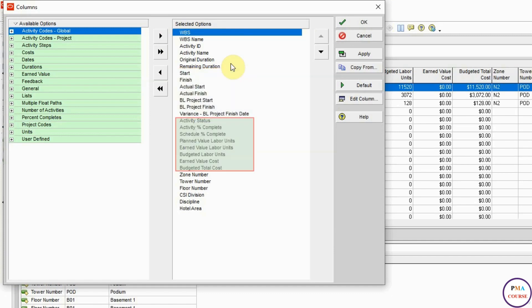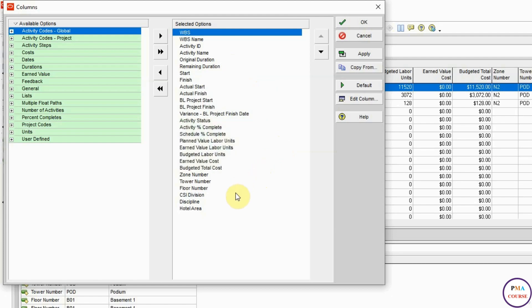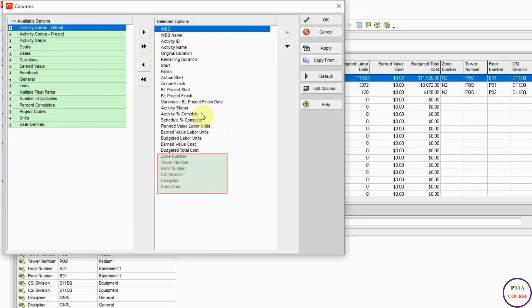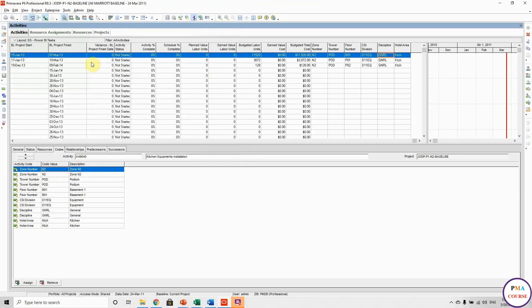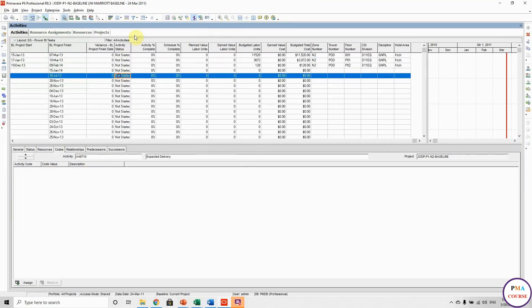The third category is activity status and earned value information: schedule percent complete, planned value, earned value, budget at completion units, and earned value. So all our earned value information. The last category is the codes, which we did before: zone number, turn number, flow number, and so on. I'm going to share this layout with you.